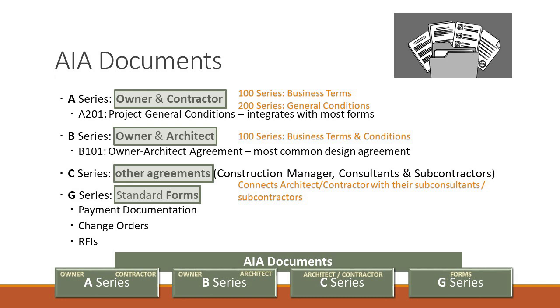So when you get this application for payment or invoice, as the owner or the architect reviewing it, you're going to go through this whole list. Here are all the trades working on the project. Here are all the price points, and here's how much we paid. So you can track and follow it. That's one part of the G-Series, the application for payment.